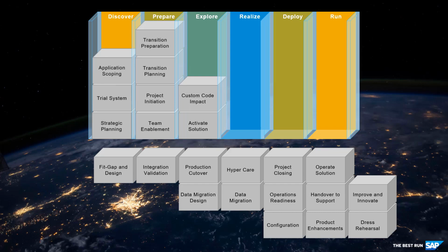The conversion to SAP S/4HANA may impact your custom code. A first list of impacted custom objects has been identified in the SAP Readiness Check. You will need to identify and prioritize affected custom objects that are used productively and that must be adjusted as part of the system conversion project.